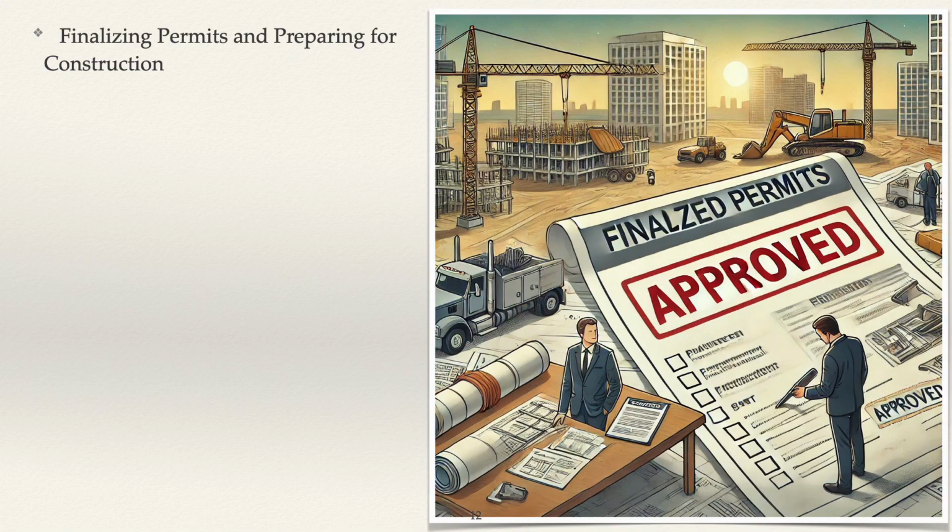B. Pre-construction checklist. Before starting construction, verify that all permits are in place, ROW access is secured, and compliance measures are documented. Conduct a final review of regulatory requirements to ensure readiness for construction. C. Coordination with client and regulatory agencies. Work closely with the client and regulatory agencies to confirm compliance and address any last-minute requirements. This coordination ensures a smooth transition from permitting to the construction phase.